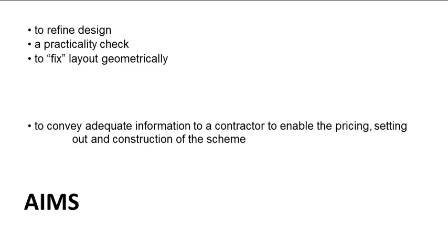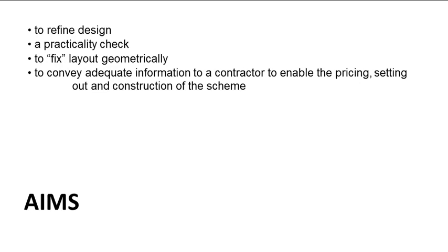It also defines the technical issues, such as drainage and other surfaces, as well as defining the levels of detail required for the project. It allows you to firm up the loose freehand drawings and turn your loose curves into geometric curvilinear design. But most importantly of all, it allows you to produce a set of highly detailed documents that allow several contractors to competitively price the project and eventually not only set it out, but construct the scheme as well.